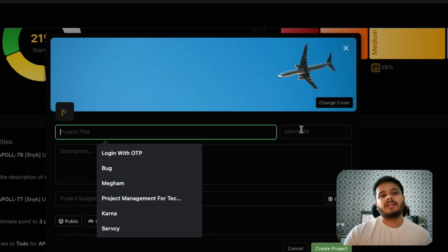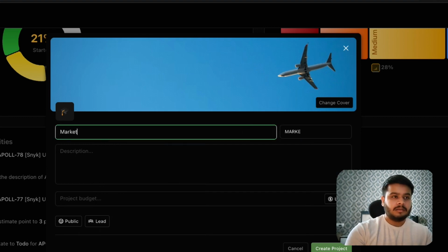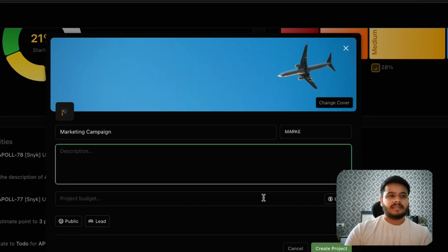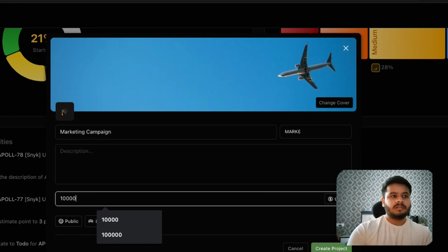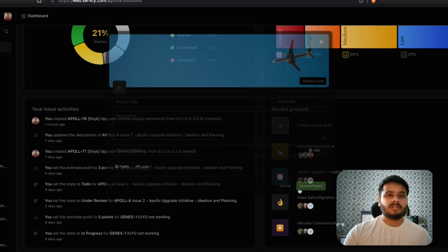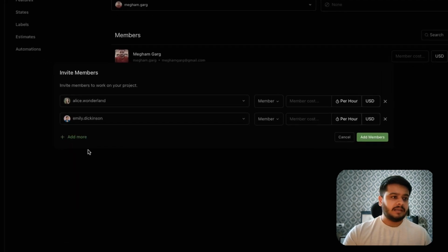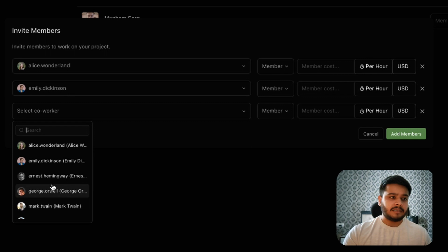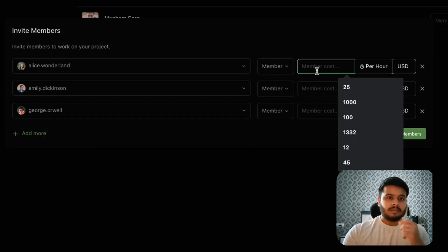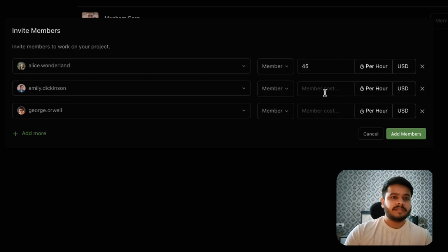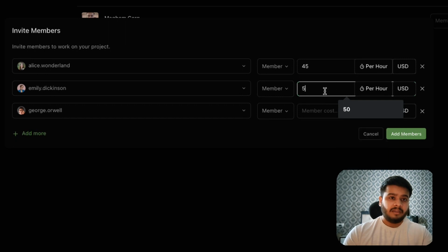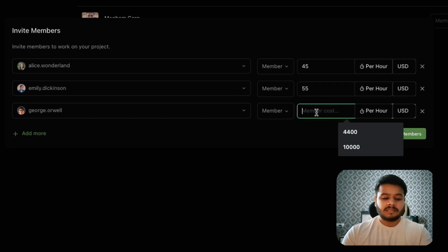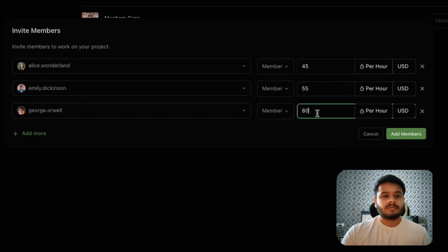You can assign a title, marketing campaign. You can assign some budget, let's say a $10,000 project, and then you can create that project. Let's add Alice, Emily, and George. Now assign cost to that particular member. For example, Alice is charging me, let's say $45 per hour for this project. Emily, let's say 55, and George is charging me, let's say $80.